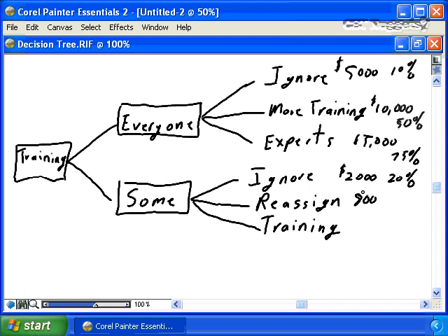Because the original team itself is not performing appropriately, we're putting the reassignment at a very low value, but there's going to be significant other impacts to the team as a result of team dynamics. So we're giving it a probability of taking that action of only 40%. And finally, provide more training. It's not going to be as expensive as providing training to the entire team. So we're ranking that at a $5,000 level and a 50% probability of the action that we'll take.